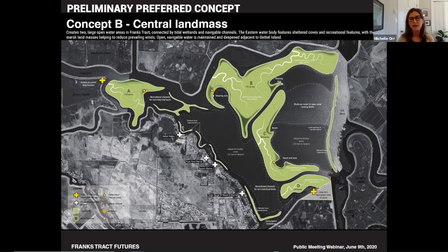Also, our engineer recommended doing some pre and post construction surveys, for example in Piper Slough. Survey it before you start construction, and then after construction, if there has been siltation in Piper Slough, use a clamshell dredge to dredge back out any silted areas.